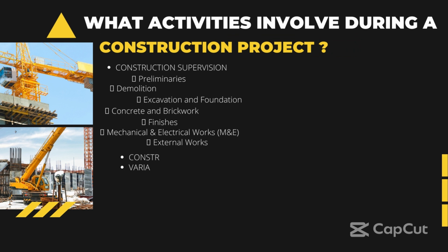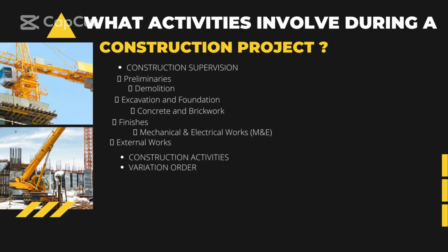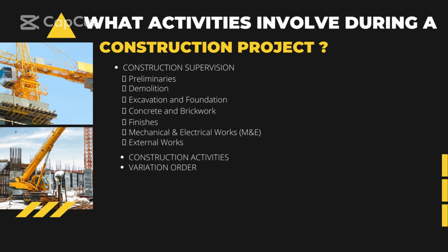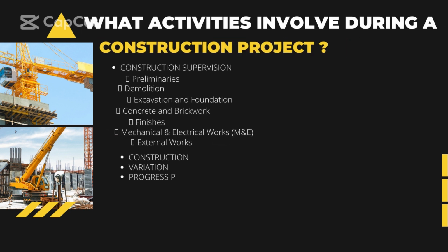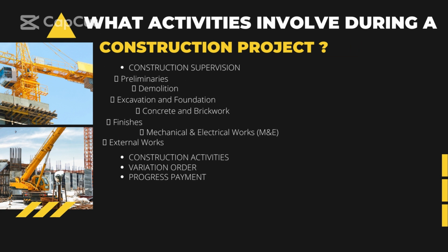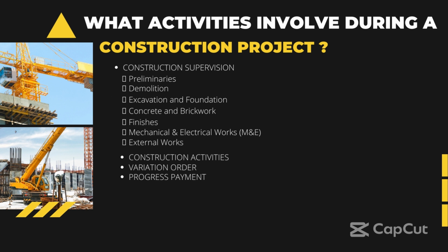Fourth is progress payment. In the construction industry, a progress payment is a partial payment made to a business or contractor after the completion of a predefined stage of work, for example, a demolition or the addition of a roof and siding. These installments replace other approaches such as a single lump sum payment at the end of a project or a half upfront, half at the end arrangement.